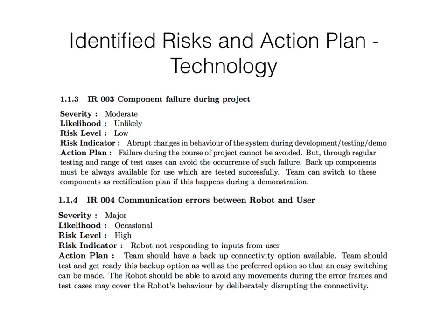But if we go through regular testing and we know the characteristics of the component, we can minimize the occurrence of this happening. Also, a good way to deal with this risk is to have a backup component which is available for use and tested successfully.